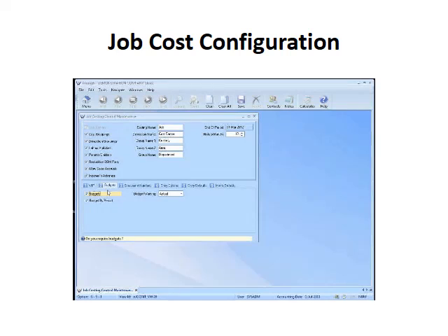Budgets, we talked briefly about that a while ago, so this is where you can turn on budget. And you can either budget it by period or not, so I'll turn that off. You have an ability also to have warnings, so should you exceed your budget, do you want it to give you a warning based on you exceeding your numbers, exceeding your actual amount or your charge amount, or giving you no warnings.